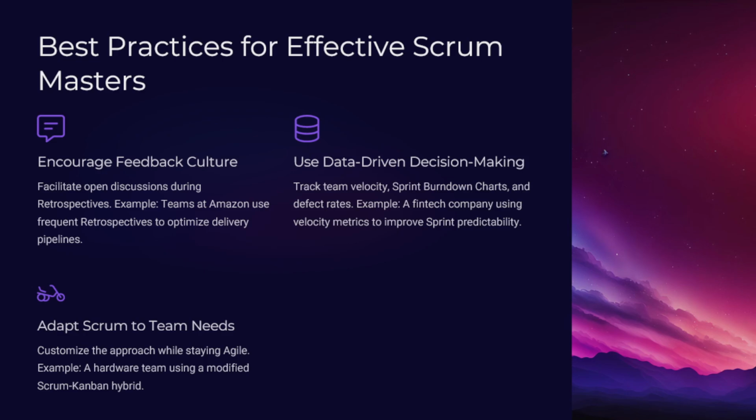Also, one of these best practices is to use data for decision making by tracking the velocity, the sprint burn down charts, and the defect rates, which we're going to discuss more in depth in the next sessions. So make your decision and the team decision based on the data, not based on anything else.